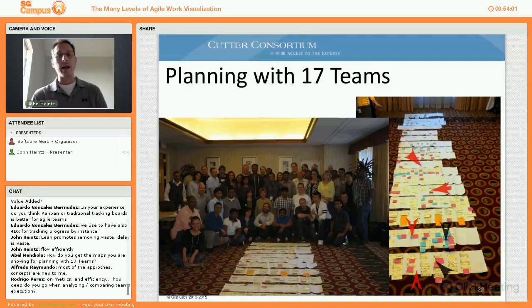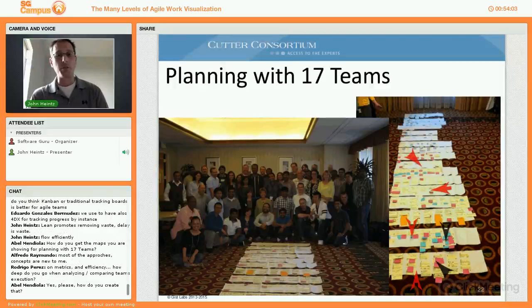That actually is simply a piece of butcher paper, a roll of paper, and we cut them and folded them so that we had 8 regions. We were planning 6 sprints, but we had a couple of placeholders for work that might be tacked on the end. And then we used 3M Post-it notes of various colors to fill in those sprints. So this was really just a paper exercise that was shown here in this activity.